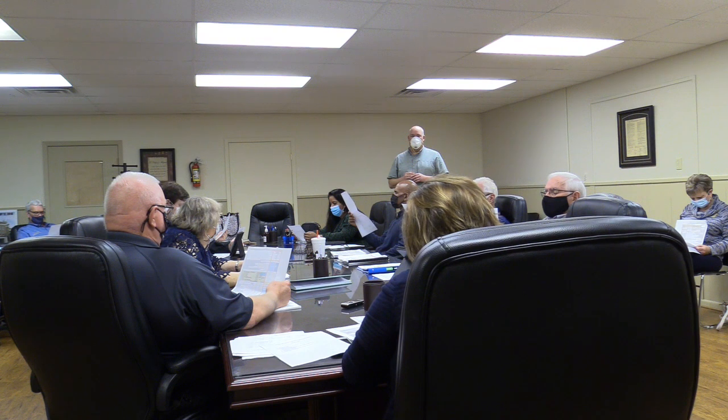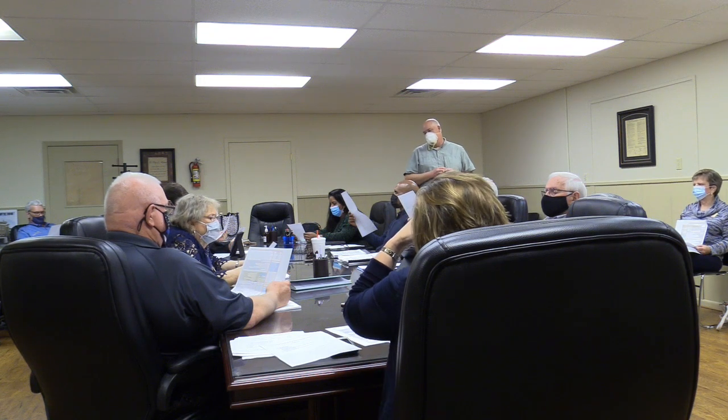Okay. So that's basically what that is. A credit and reduction of acoustical panels. We had some acoustical panels in the large courtroom. Those got smaller, okay. So we got a credit back, because they're just not as big as we showed them originally. So in essence, it comes to a net add of $32,746.